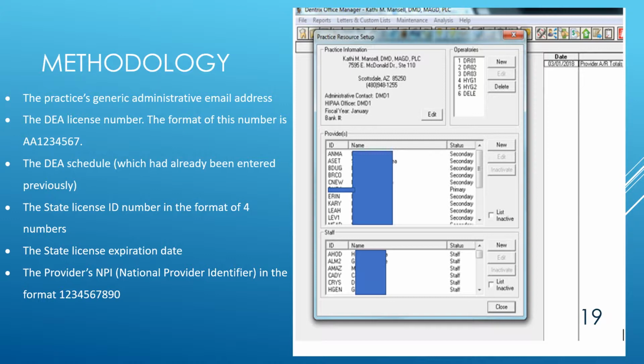Lessons were learned for sure, the most painful of which was to always investigate all possible costs associated to a solution. Now, the vendor doesn't put that information front and center in order to perhaps prevent providers from getting cold feet prior to even starting the implementation and getting as far as we did. However, that is no excuse for not doing more thorough research into the solution prior to starting the implementation.